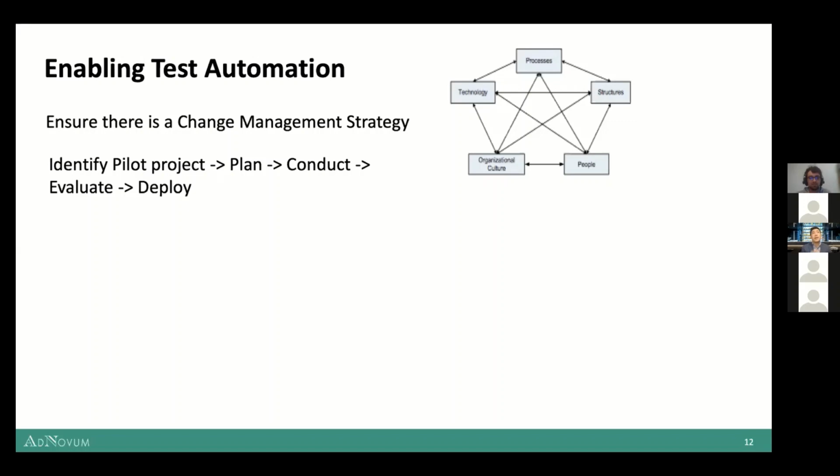You should pick a project with a length not too short, not too long, maybe 3 to 6 months. So the project should not be too critical, but also not too trivial, right? Do not pick a project that has a fixed release date or is on a critical path, because there will be delivery pressure on the team, and you might not be able to actually achieve what you really want to get from there. Make sure that you pay attention and try to help the team through their retrospective.